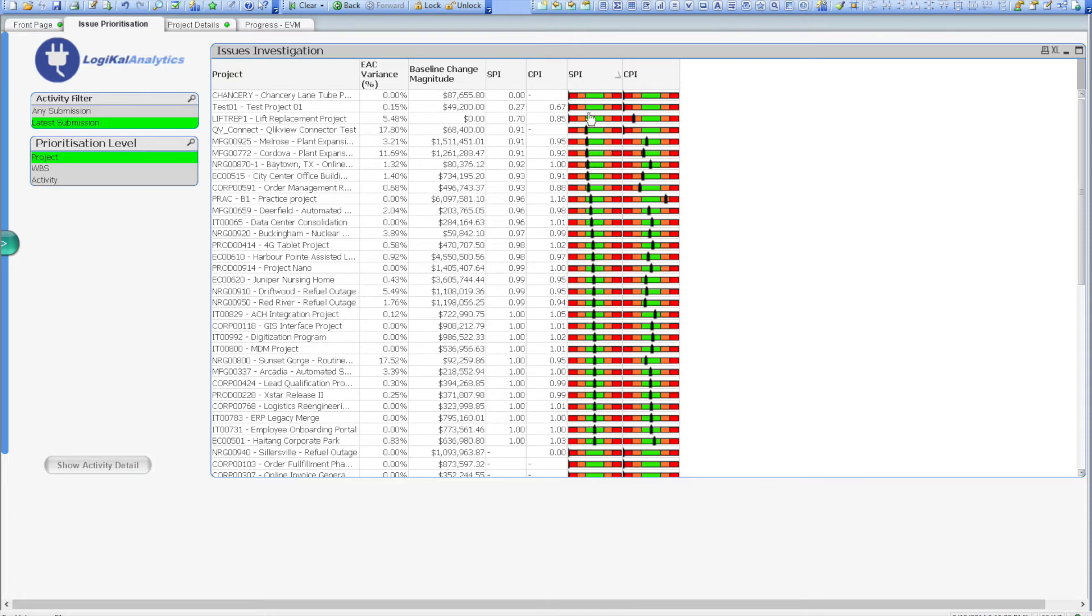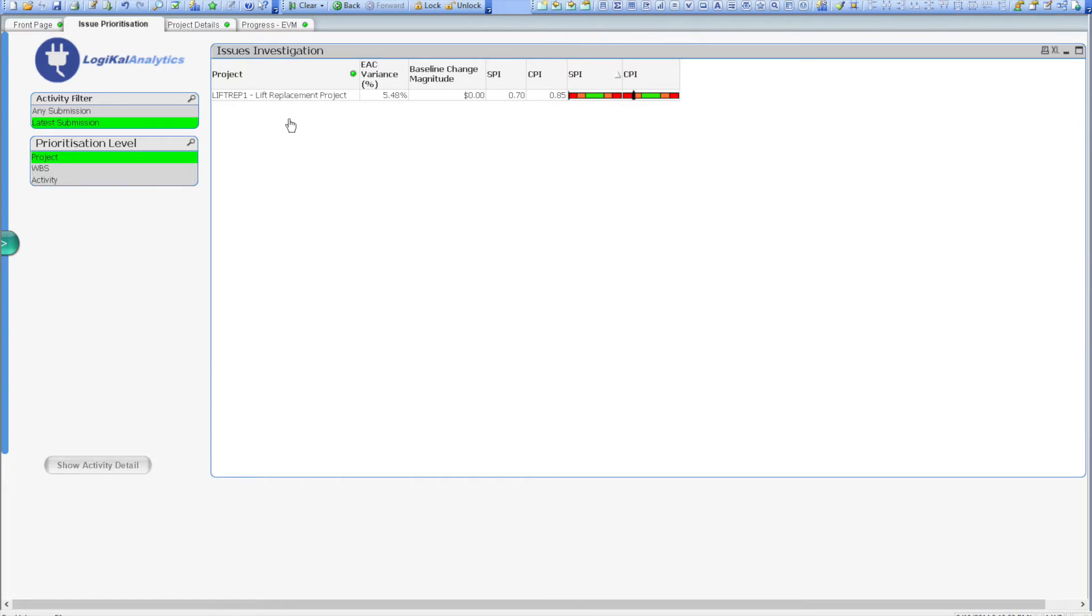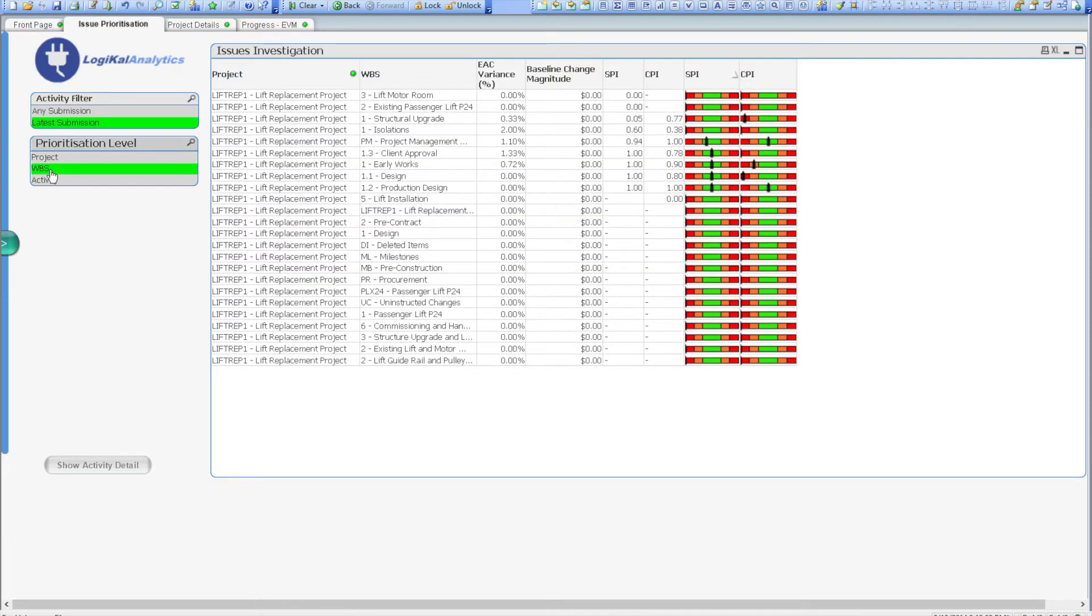However, there are three outside of this band, and these are the ones that we'll need to investigate. So simply clicking on the lift replacement project, we immediately filter all the information on the dashboard to that single project, and then from there we can simply click on the WBS prioritization level to drill down and try to identify the WBS elements where the performance issues have occurred.